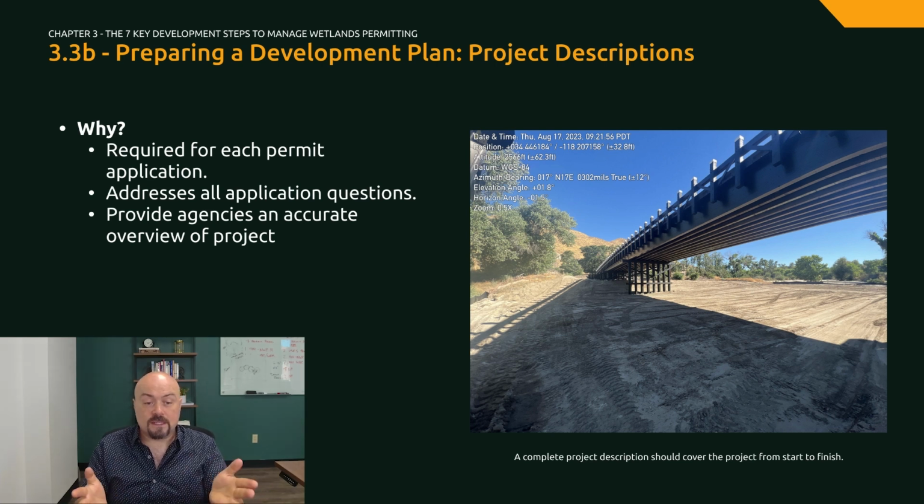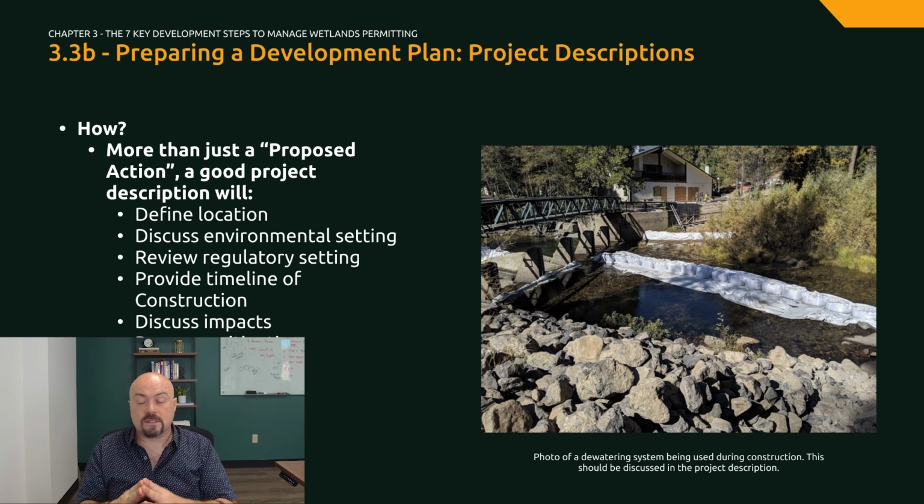Project descriptions need to be detailed because they act as entitlement documents for your permits and provide the baseline information for any CEQA or NEPA review that is required to obtain these permits. It is important to include all aspects of the project in the description because if they are not approved with the permit, you may not be able to complete the project with a modification if agency staff become aware of the missing analysis. Accurate project descriptions need to describe more than what you are doing.